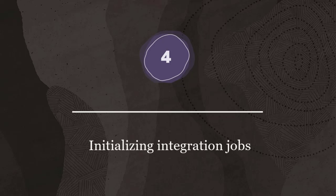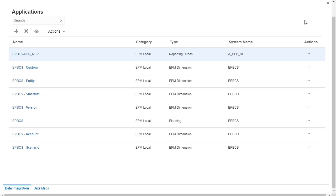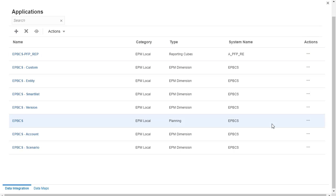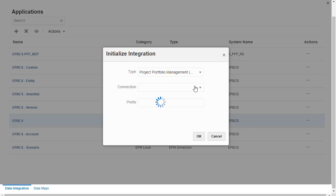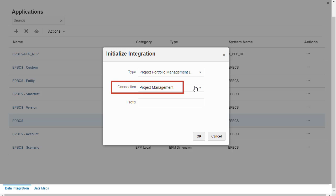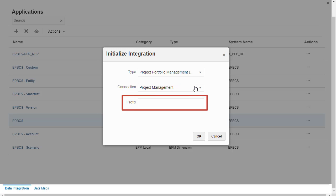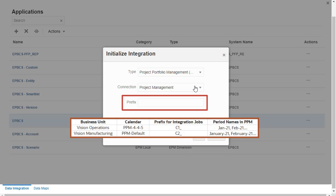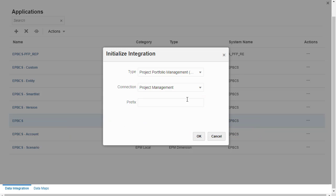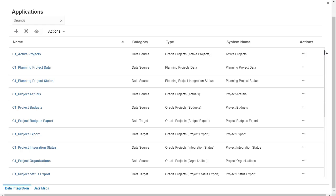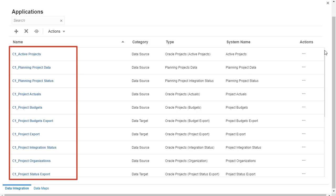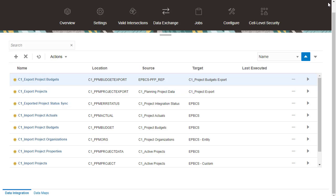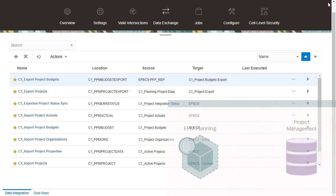Step 4: initializing integration jobs. Initializing the integration creates all out-of-the-box integration definitions for EPM Planning and Project Management. I'll initialize integration definitions for the Base Planning application. For type, select Project Portfolio Management. For connection, select the source system you defined. You can add a prefix to an integration definition. When integrating multiple accounting calendars, you must initialize a set of integration jobs for each accounting calendar you want to integrate. You add a prefix to identify the accounting calendar associated with each set of integration jobs. Additional out-of-the-box data source applications are loaded to the application page. After running the initialize integration tasks successfully, the following out-of-the-box integration definitions are loaded in Data Integration.